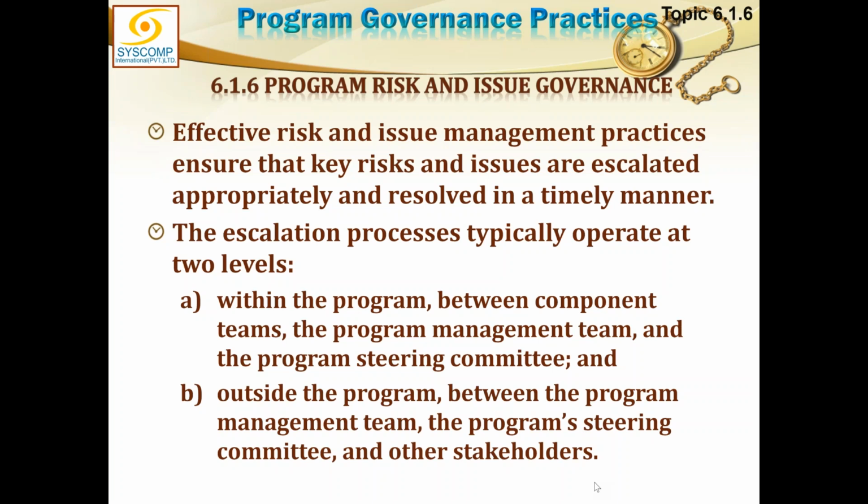So now the 5th strategy is escalation of the risk. We already have been in the habit of understanding escalation as related to issues or problems. So both ways: a risk is something which has not happened, and an issue is something which has happened, right?